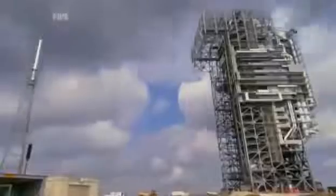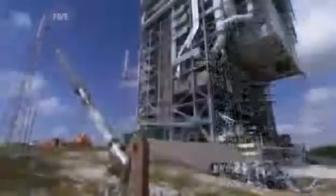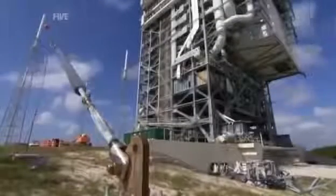It's 2 days before demolition. The team can now move the guy wires on the lightning towers. One worker climbs the tower to move the cable on the mast. Another starts to loosen the cable anchor on the ground. Working together, they release the tension, causing the tower to become unstable.